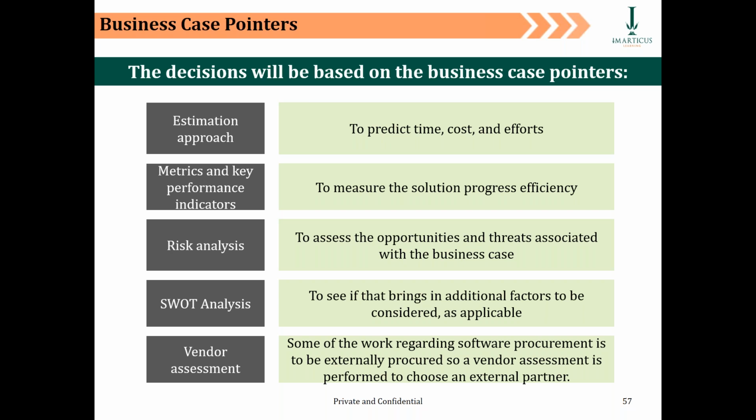Which means that if I develop 100 technical objects for my solution, 99 will pass all testing, and only one will not. That's the margin which I have to monitor and control the efficiency of my actual development build-up process for the solution software. By the way, 1% is too high. I just took an example. If you really ask me, it is not more than 0.3%.